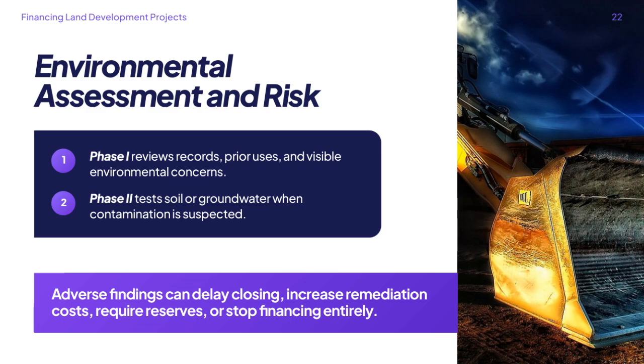Now, why does this matter? Because adverse findings from either phase can significantly impact the project timeline and costs. They can delay the closing process, increase remediation expenses, require setting aside financial reserves, or in some cases, completely halt financing. Understanding and managing these risks early is crucial for successful financing and development of the land.